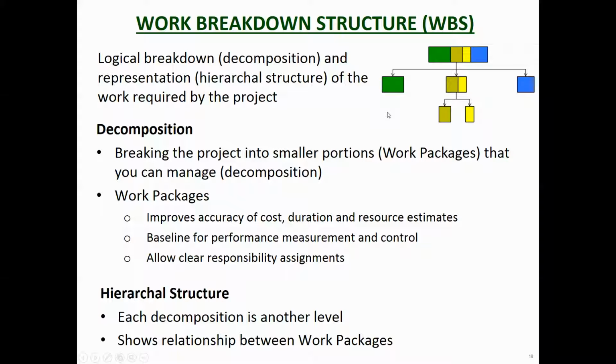Also, when you're doing the work, you can actually manage each work package. So instead of looking at the whole road and saying, well, how far complete are we? You say, okay, well, that curb and channel work package is 50% complete. The subgrade work is maybe 25% complete. The foundation work is 75% complete. So you can look at each one of those work packages and very quickly determine what sort of progress you've got on it.